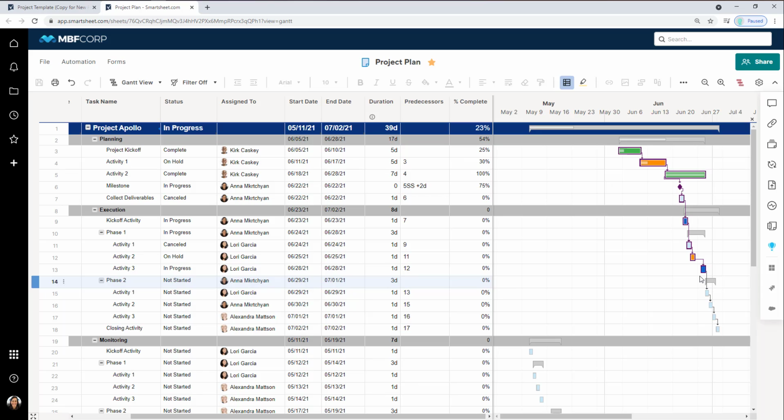What we've looked at here within our project settings are going to be the critical capabilities that really let you manage this work, not just as work in a sheet, but as a project. So to review, we've come up to our project settings and enabled dependencies, which gives us two new columns, our duration column as well as our predecessor column. Our predecessor column is where we're tracking all of our relationships, and we can define those using predecessors or by clicking and dragging in our Gantt chart.